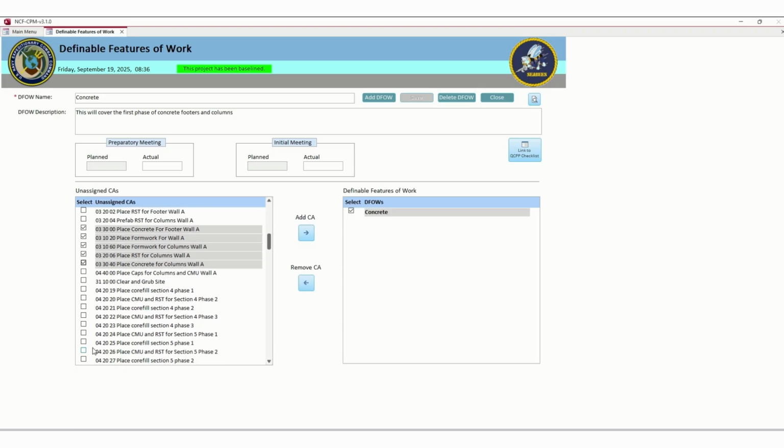Okay, we're not doing anything to deal with the wall. That could be a different cache sheet as a masonry to go over the first section, and that will cover all the sections of wall where you don't have to keep having a lot of preparatories. You don't need preparatories for every single cache sheet. That's not what a preparatory is used for. It's for definable features of work.